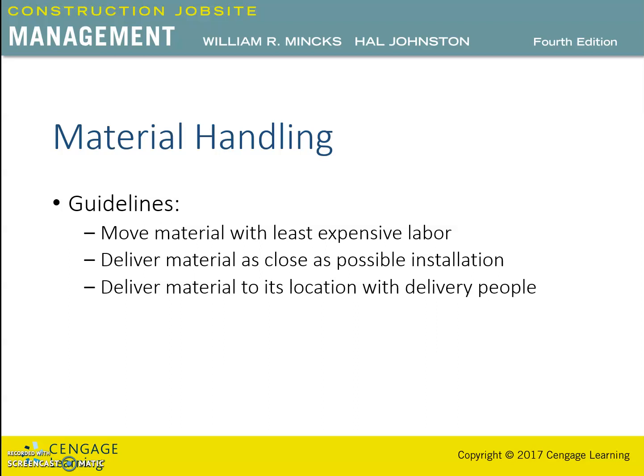Material delivery to the job site, and even to the location within the job site, is most economically done by the delivery people employed by the supplier of the material. Although there is normally a delivery charge, the supplier's delivery crew probably receives a lower wage than the job site labor. The delivery crew knows how to handle material efficiently and usually is interested in prompt delivery of the material.